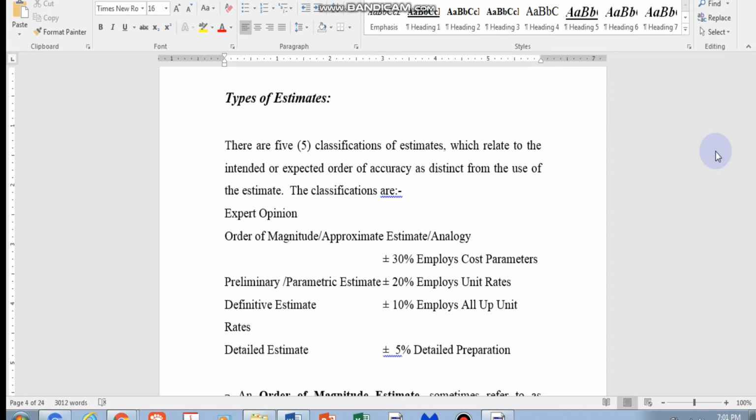They will take out those outside the standard deviation, and the mean will be the definitive estimate. So the estimate that they pick will be revolving around that definitive estimate. So it is a very important estimate to look into, actually. Okay, so that is the gist of definitive estimates.